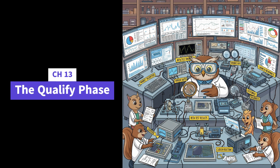This is where it gets really tangible, right? Especially for physical products. You've got it. For actual physical goods, this is about the manufacturing itself. Quality control, packaging, the whole logistics and supply chain setup. Getting it built and shipped. Exactly. For software, it's more about setting up hosting, configuring servers, making sure the admin side is ready. And services. Services could mean getting equipment, hiring and training people, setting up the processes to deliver the service. And manufacturing especially can have long lead times, materials, production. You've got to plan ahead.